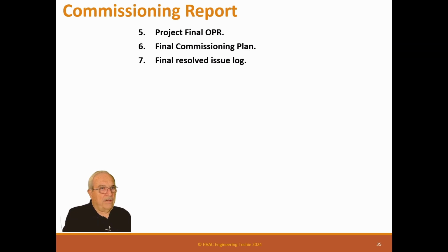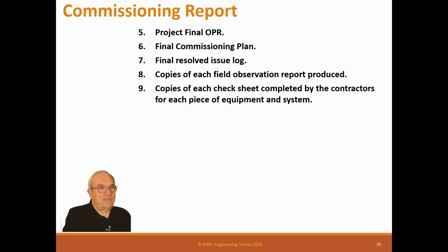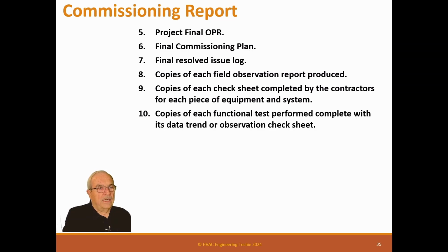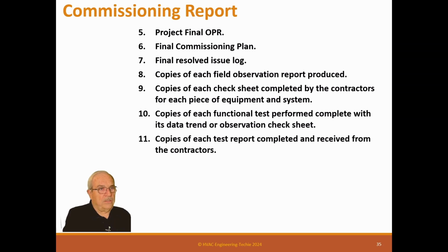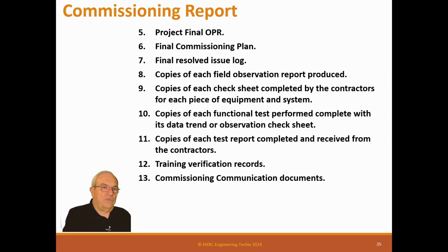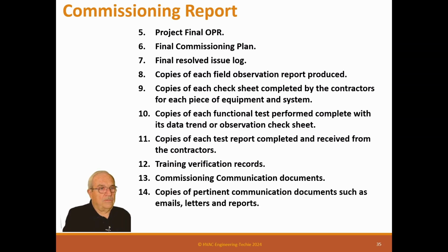Final commissioning plan, final resolved issue log, copies of field observation reports, copies of each check sheet completed by the contractor for each piece of equipment and system, copies of each functional test performed, complete with data trend or observed check sheet, copies of each test report completed and received from the contractors, training verification records, communication documents, copies of pertinent communication documents such as emails, letters, and reports, test instrument page.